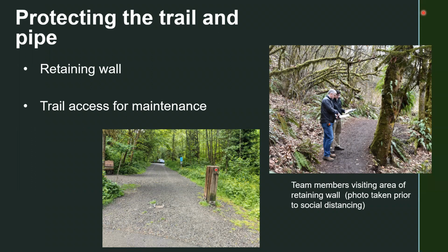And just for context, in this area of the Upper West Trailhead, the existing pipe and the associated local City of Bellevue sewers cross the stream, I believe, 4 times. So we will be removing all 4 of those active sewer crossings in this area. And we will have a stream that will be able to meander within limits. We're going to be using soft bank stabilization, which I'm going to talk about in a little more detail on the next slide. And we will be creating additional habitat in this area for the salmon that use this stream.